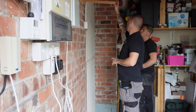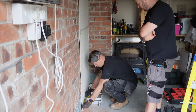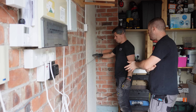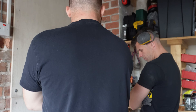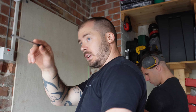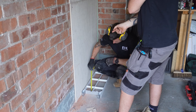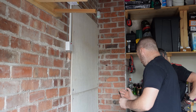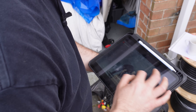Getting everything to look nice is one of the longest parts of the job. We're discussing the trunking — the stack is only quite small because it's only got one battery at the minute, around 550mm. We're thinking about whether to allow for future expansion. The decision is to go center and work around that, and to do the trunking last, get the batteries into position first. Now you can move the package to the ideal installation site and unpack it.